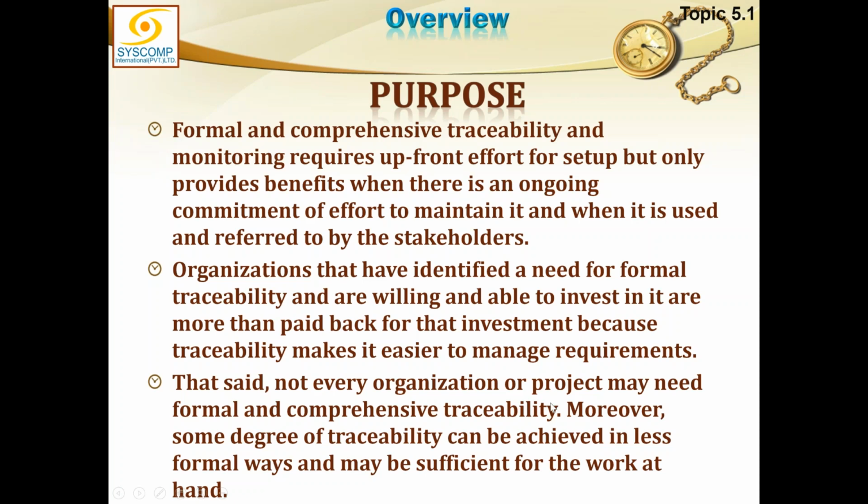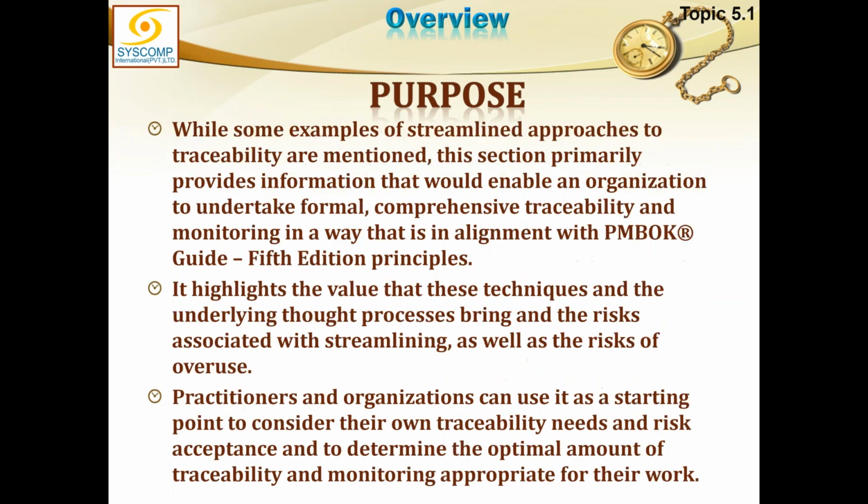So that establishes that the level of traceability required for every project is not the same. The more complex and larger projects probably require more traceability, but for small projects, for small little things which we can agree verbally, probably there is no formal traceability going on, but there is an understanding. Some degree of traceability we should be able to achieve in less formal ways. So this may be sufficient for the work at hand.